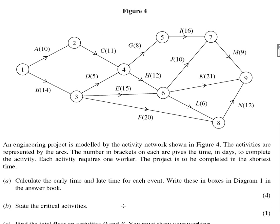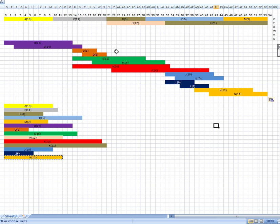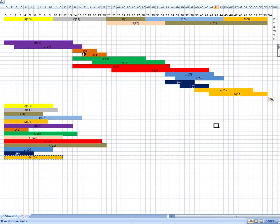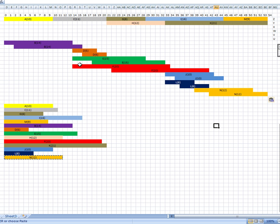Next part of the question, I'll do this. Total float on activity D and F. So from this, the float on D is 2 and on F is 8. Basically, you work out what's the earliest time it can start and what's the latest time it can start and that gives you the total float. So for D, the earliest time it can start straight from the chart or the graph is 14. The latest time it can start is 16 because it's got to be finished by 21 and it takes 5. For F, the earliest time it can start is also 14. That's node 3. We've got to be at 8 by 42. So F must have left 3 at 22. So it can start any time from 14 to 22, giving it a float of 8.